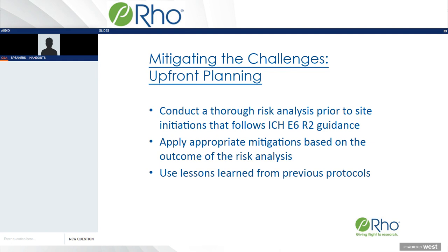If you complete these steps in the planning phase, then you can put a process in place or some active controls in place. So as you identify these risks as the study is ongoing, you can manage them appropriately. By setting quality tolerance limits and thresholds for actions, you already have those actions defined before you see the risk.